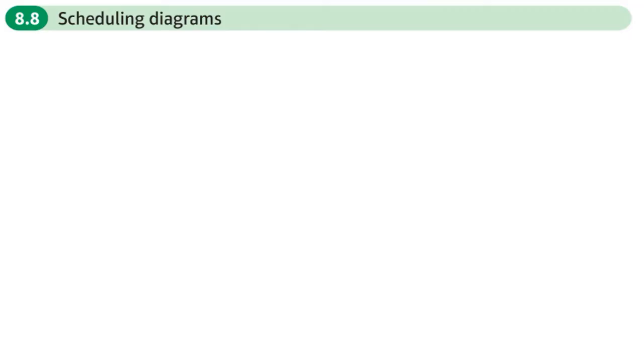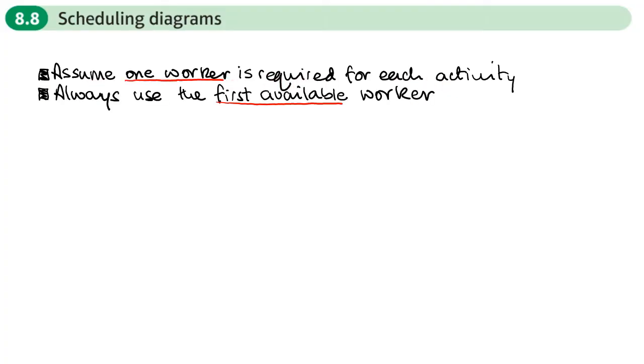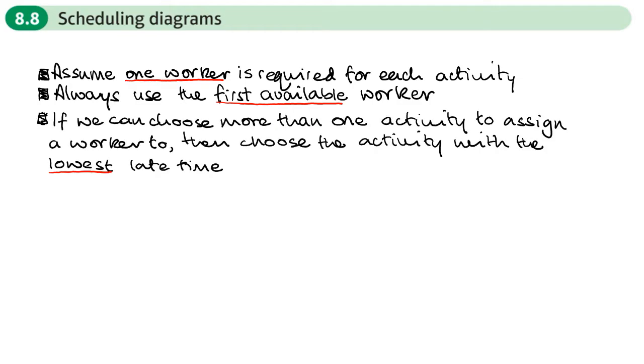When we draw a scheduling diagram, we are assigning workers to activities. We're going to assume that one worker is required for each activity. We're always going to use the first available worker. If we can choose more than one activity to assign a worker to, then we're going to choose the activity with the lowest late time.